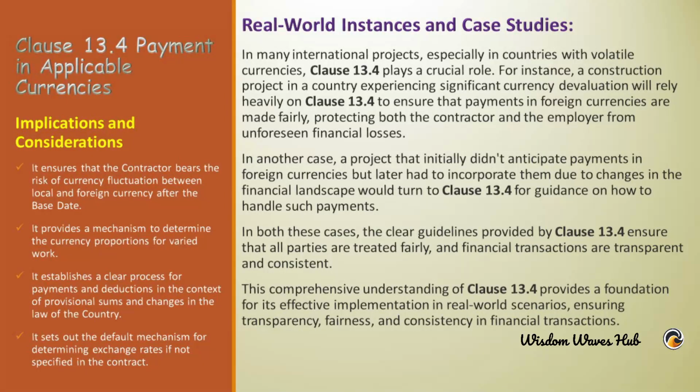In many international projects, especially in countries with volatile currencies, Clause 13.4 plays a crucial role. For instance, a construction project in a country experiencing significant currency devaluation will rely heavily on Clause 13.4 to ensure that payments in foreign currencies are made fairly, protecting both the contractor and the employer from unforeseen financial losses.